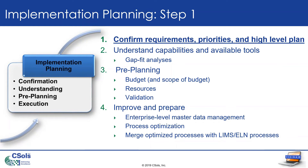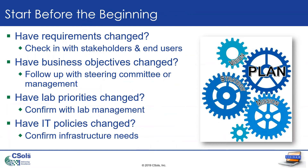Step one is to confirm requirements, priorities, and your high-level plan. We actually want to start before the beginning of the project — going back to where we first started picking a vendor. When CSALS does a vendor selection we define requirements, understand business objectives, and understand policies and priorities. It can be six, eight, sometimes eighteen months between vendor selection and when implementation actually starts, so we want to go back to the lab, back to our stakeholders, and make sure requirements are still the same. Check in with lab management: have priorities changed? Do we have new instruments?